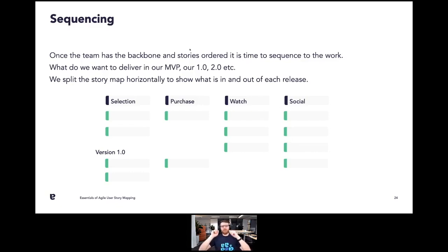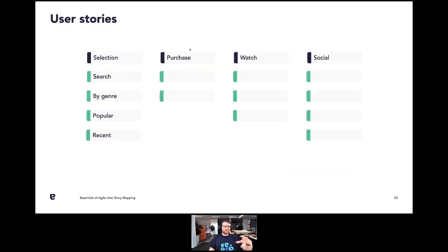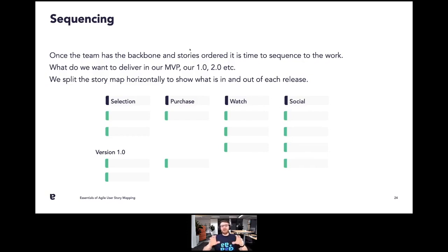things, these gut things that are just off the cuff. We can put them up on the wall. And then if we have time to sleep on it, for instance, and come back the next day, we might come up with new ideas, new user stories, new activities, whatever it happens to be. So I tended to split it into two sections: 2 hours, which was everything up to the personas, the activities, the stories, and then another 2 hours to come back the following day.